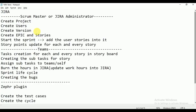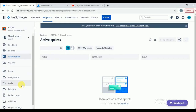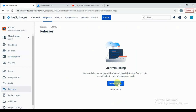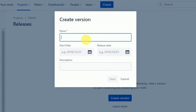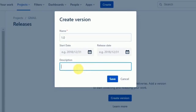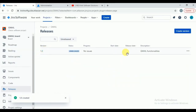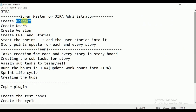Version talks about production release — it may be in one sprint or multiple sprints. To create the version, go to 'Releases,' then 'Create Version.' I am creating version 1.0 and adding a description like 'Gmail functionalities we need to release in this 1.0 version.' Click on save. The 1.0 version is successfully created. So far we have created the project, users, and version. Next we need to create epic and stories.